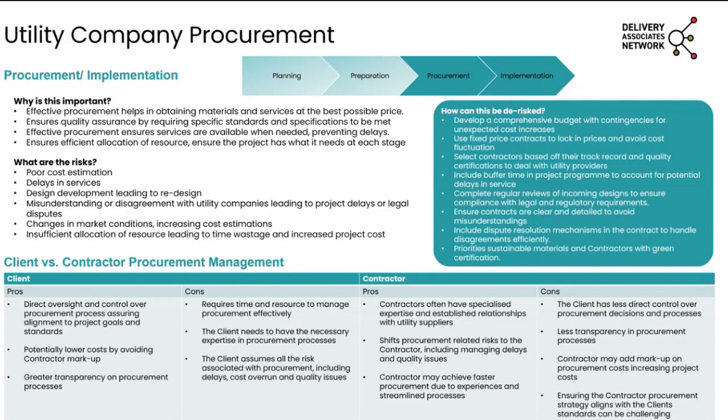Utility companies can look to, if this is being funded by a third party, maybe use that as an opportunity to get enhancement to their network if somebody else is paying for it. So we need to be prepared to challenge what the utility company are coming back with and just understand why some of their designs are as they are.